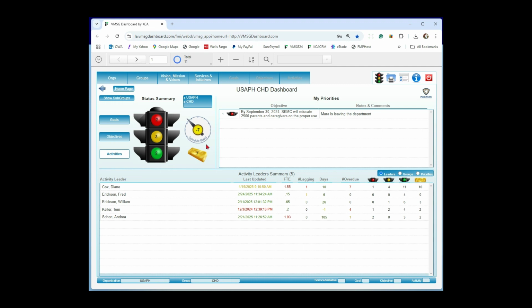If it's 60% complete at halfway through the year, it's 36, 37 days ahead of schedule. If you had 2 of those activities, one was 40, one was 60, they balance out to 0. So what it's doing is taking all of those 14 activities and doing that calculation on each of them, adding it together, and it says overall we're 7 days behind schedule.